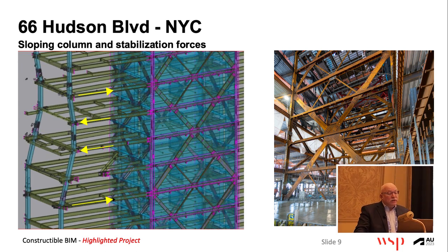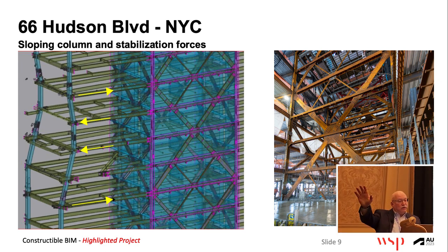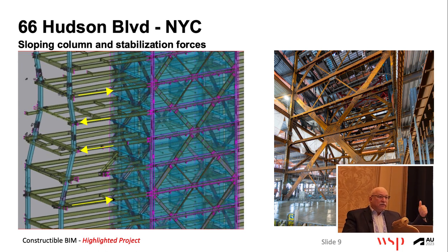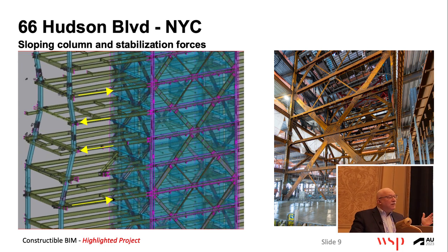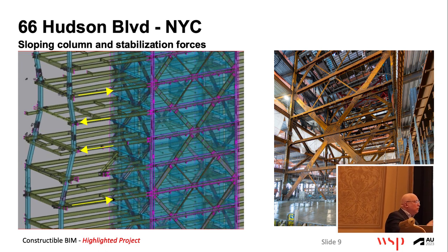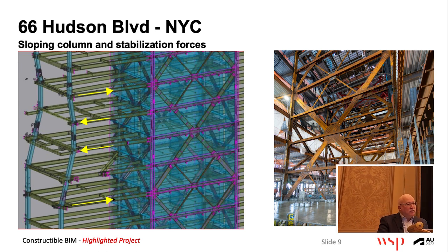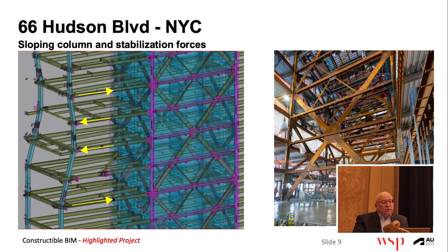What saved this project? We were well advanced in producing the Tekla model and the connection engineering, although construction had just started in the field. That whole heavy duty calculation review and shop drawing review was just taken away from the critical path. The fabricator was down in Virginia, and they got this deal and were working through COVID. There were people on site who couldn't work. In any case, they met the move-in date, and there were no liquidated damages.